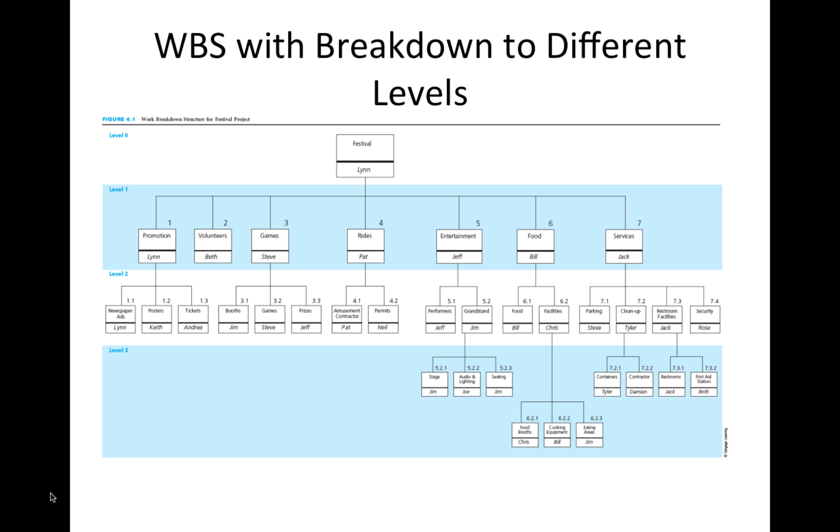At the next level, this will be at which the project manager wants to monitor and control the budget and can collect data on associated cost and the value of the work completed during the performance of the project. The work breakdown structure needs to be created using a graphic chart format, similar to the one on your screen. Now you can use Microsoft Word or any other application to create this digital format. This figure here depicts the work breakdown structure in a graphic chart format.